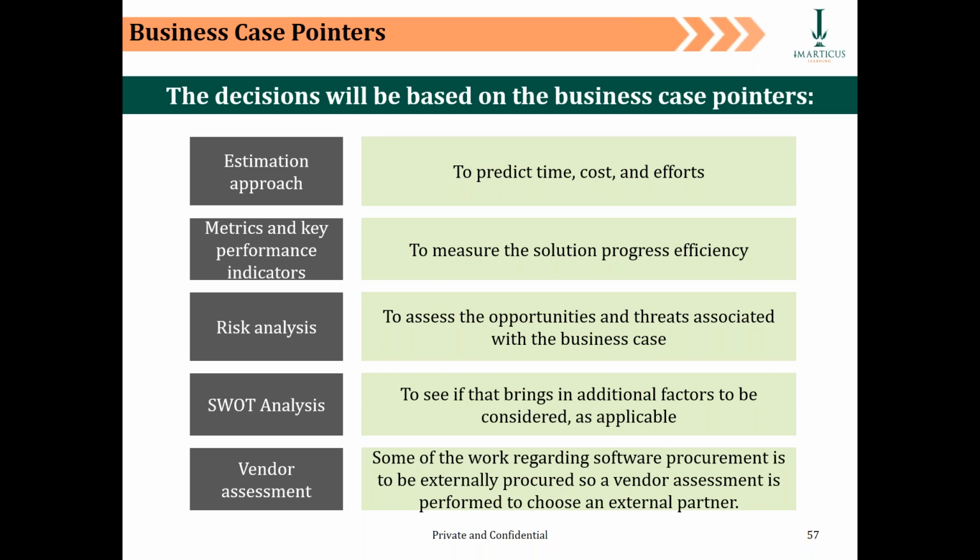In the solution build-up, there's a lot of technical development and testing. Fair enough. The accompanying target is that the defect density of my object developments for the requisite software will not be more than, let's say, 1%.